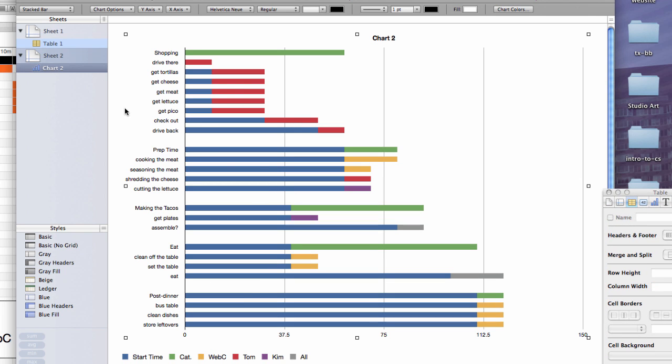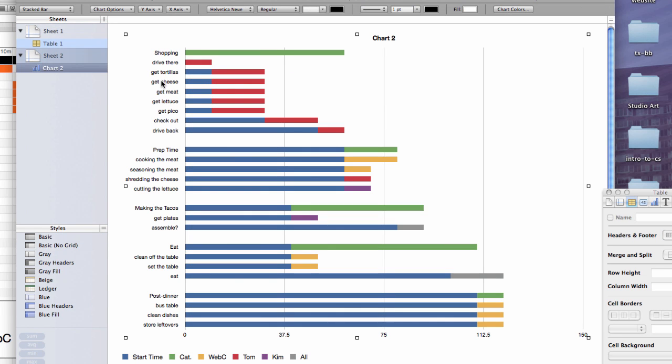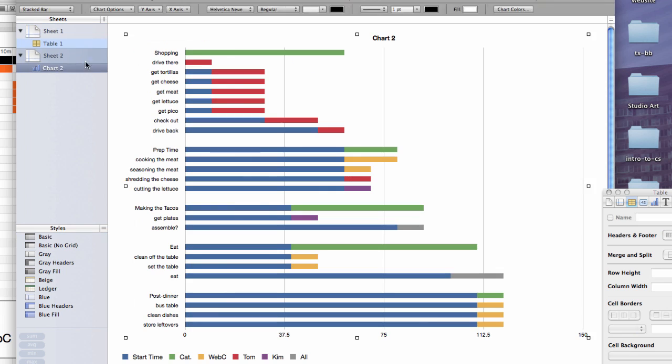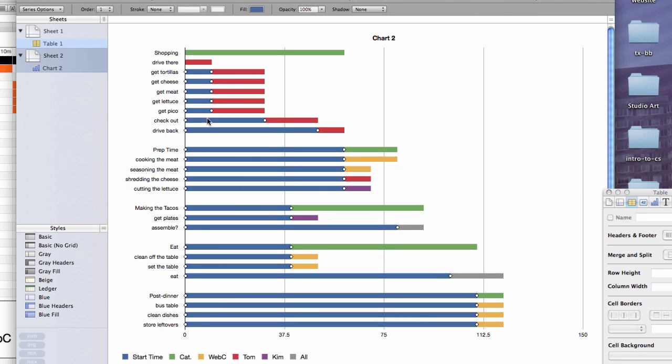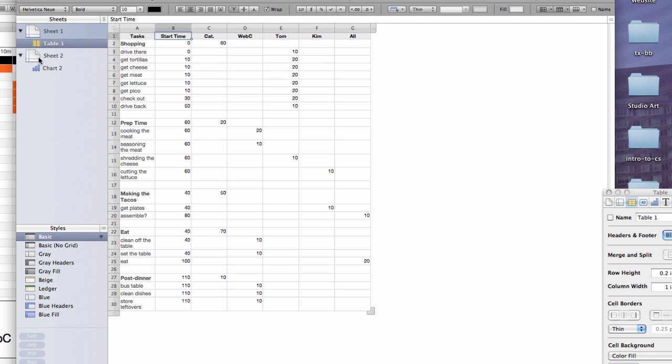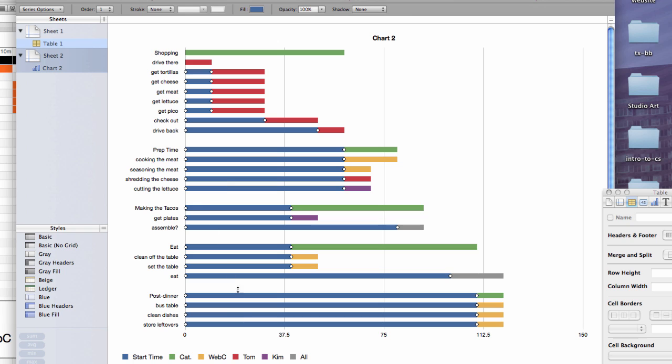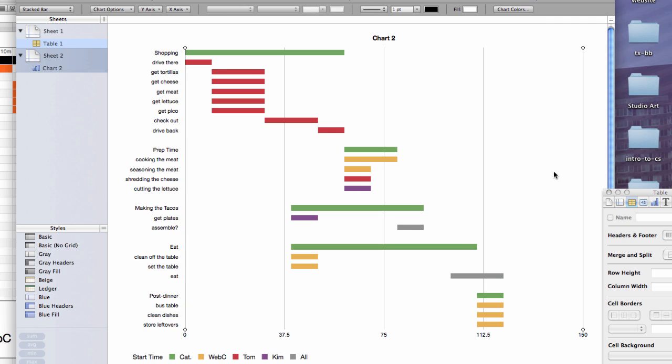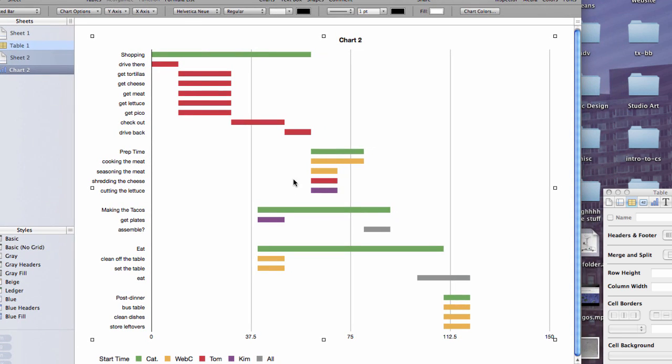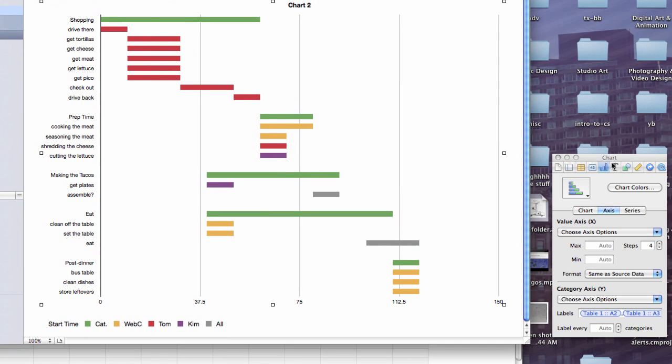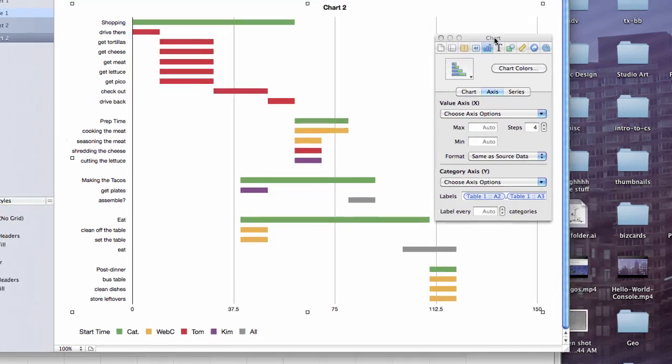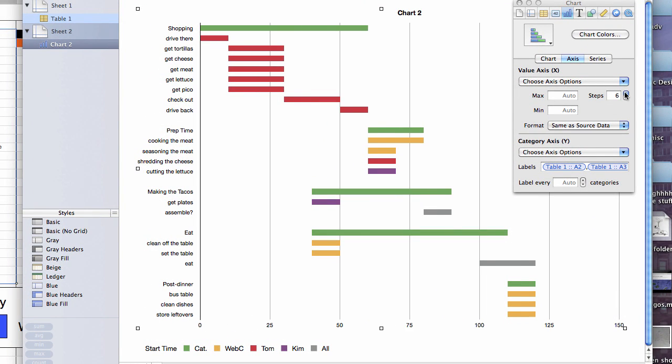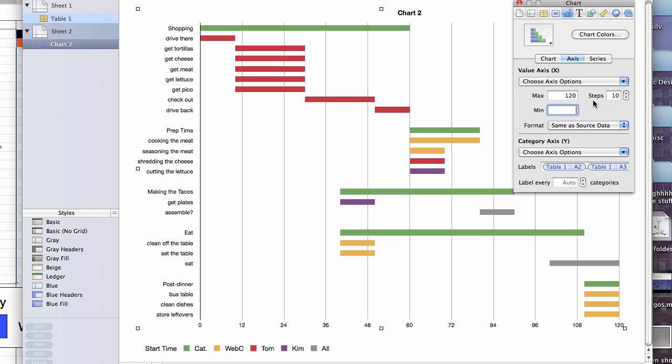The start time is an issue that it's all blue. So just like before, we need to go into that. So we click on the graph. And since we don't have them on the same one anymore, we can't just go back and click on the table. It doesn't work very well. It's actually easier just to go here and click on the color we want to change a couple times until it shows just that one. And we can tell it no fill. So this is looking pretty close to what we want. Now right now, these little lines, it makes it really hard to read because these values are too far apart. So we can change that too. If we go here in the inspector, we can increase the number of steps until it looks the way that we want. Or until we max it out. And we can even tell it what the max is to. So we could do 120 there. So that way it uses up the whole space.